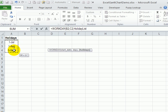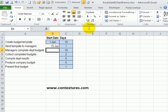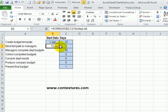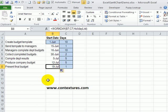So I'm going to this list, and I'll select it and it automatically puts in the name of that list. I'll close that formula. And there's the date that the next task will start. Then I can fill that down to the last cell. So we know that our last task will be starting on July 19.